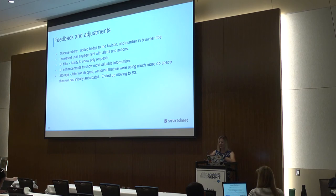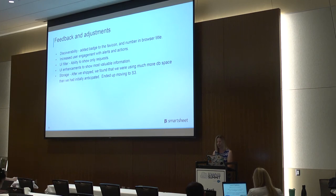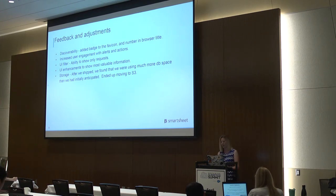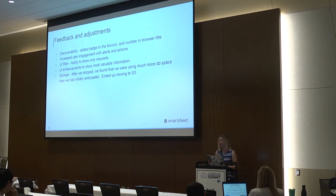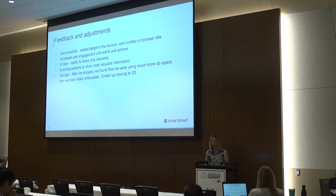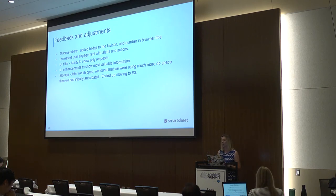Once we went live and nothing fell over — we got some feedback and made a few more adjustments. There wasn't as much user engagement with this feature as we would have liked initially, and we realized it wasn't as discoverable as we would have hoped. We added a badge to the browser tab to indicate unread notifications, and also added that number in the tab title. The automation system itself was still a pretty new feature when Notification Center first went live, so users weren't setting up enough notification rules. The lesson learned: automatically set up targeted notifications where appropriate, rather than relying on users to discover the feature and set it up themselves.